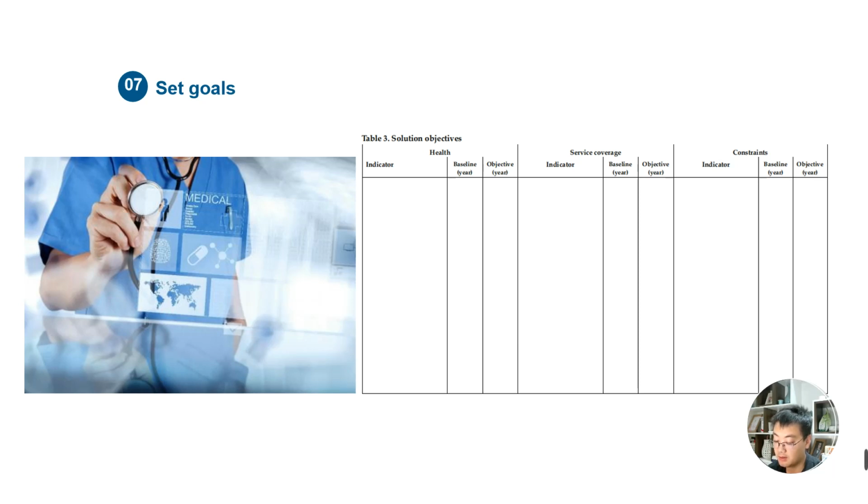Refer to the baseline, the level of metrics in the previous year's calendar. Consider the level of accuracy of the data and use the team's experience to define realistic goals that can be achieved within a year, based on the provided template as shown in Table 3.